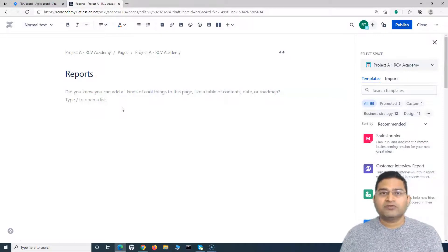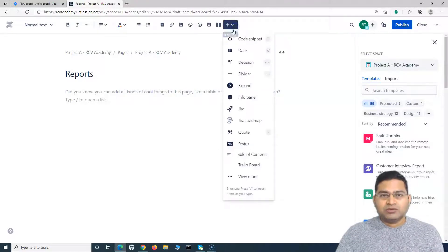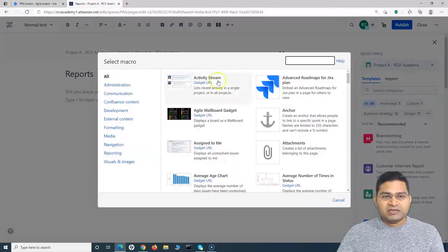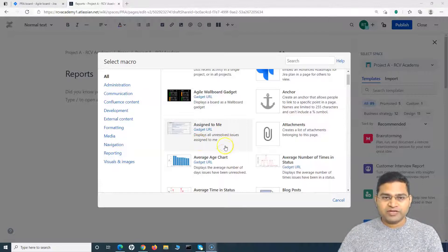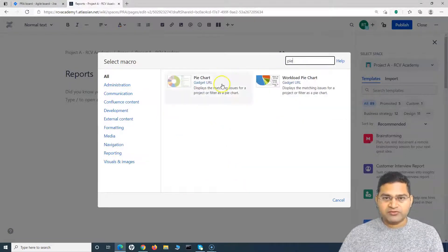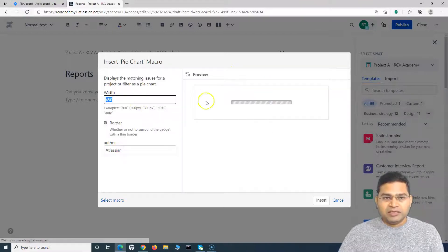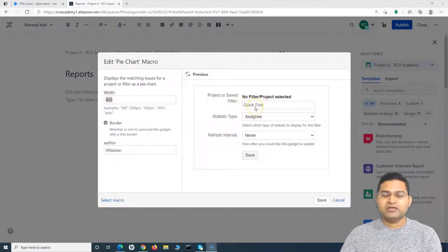Once I create this reports page, the next step is to add the reporting macros available in Confluence to pull information from Jira and display it here. To add a macro, use the dropdown and go to 'View More.' Say for example I want to add a pie chart — I'll search for 'pie chart.' Here I can use a quick filter, so I can create a filter in Jira and search for it to display all the issues of Project A.